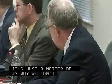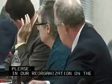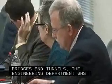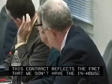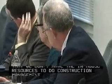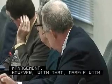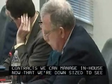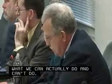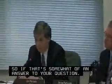Jim, I can talk to that, please. In our reorganization and downsizing of MTA Bridges and Tunnels, the engineering department was downsized considerably. This contract reflects the fact that we do not have the in-house resources to do construction management. However, myself with Joe, we're looking at certain contracts that we can manage in-house now that we're downsized, to see what we actually can do and can't do. If that's somewhat of an answer to your question. I presume that the net of it is that it's cheaper to outsource it than to do it in-house?